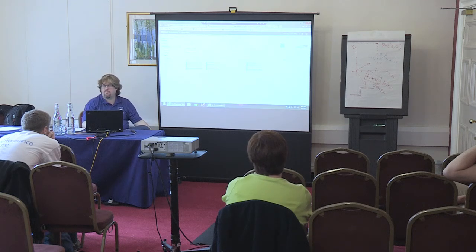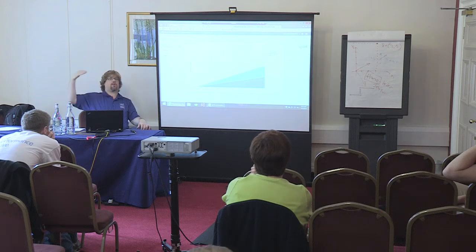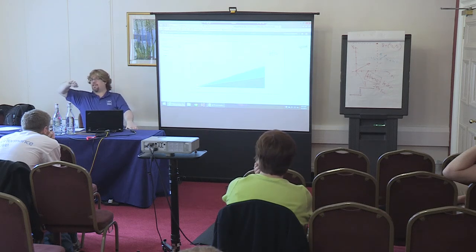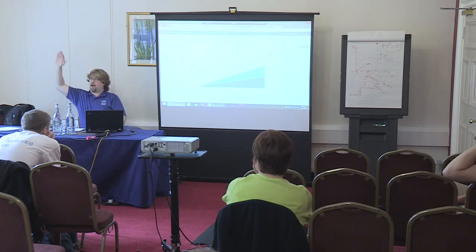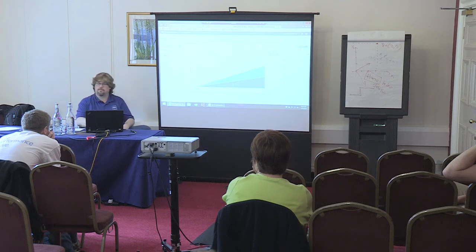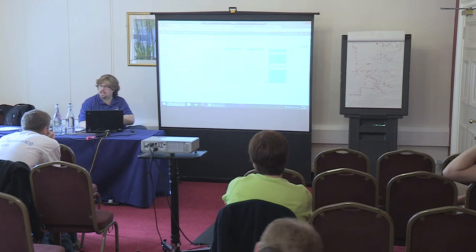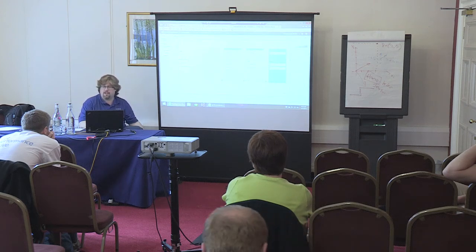And now if you look at my cumulative flow, we see we've got things at different stages. Now this is something that's not really good yet, but we're at the beginning, so we'll accept it. Over time, what we want to see is that nice flow. We want to see nice little wavy flow waters. If you see lots of spikes, you see your overall planning process and your overall delivery is not working well. Okay? And the cool thing you can do here, this is one of the places that does have customization, you can add additional steps and change the flow of it.